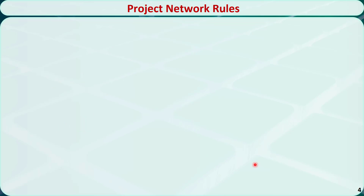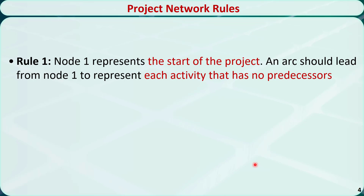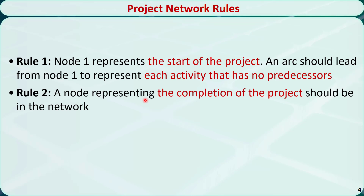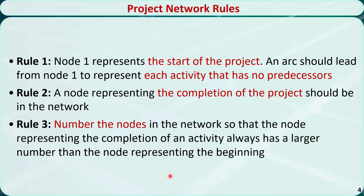There are some rules we need to follow when building project networks. Rule 1: always use node 1 to represent the start of the project. If an activity has no predecessors, it should begin with node 1. Rule 2: we should always use a node to represent the completion of the project in the network. Rule 3: we need to number the nodes so that the node representing the completion of an activity always has a larger number than the node representing the beginning of the activity.